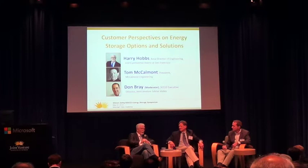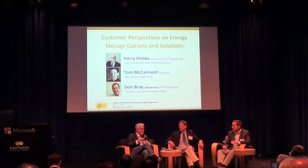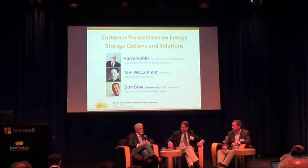Could I just follow up on how the installation went with the city and the installer over time? It went extremely well. I actually challenged the installation folks to manage the process as a critical environment. So we were very diligent from an engineering perspective in making sure that we went through each task and had someone signing off on every task along the way, because we did the installation live. It was flawless. The execution was very seamless.